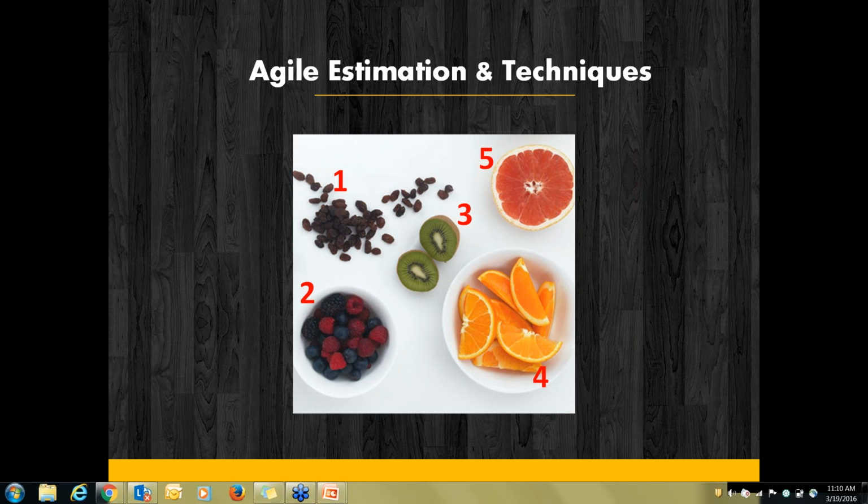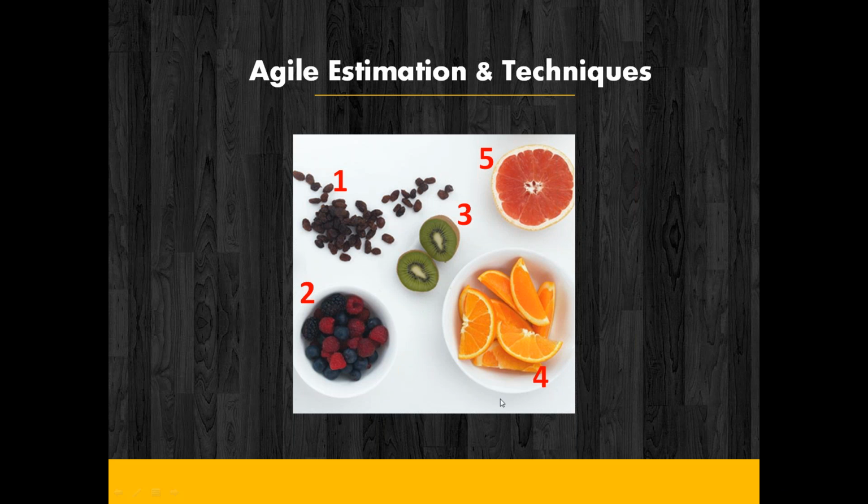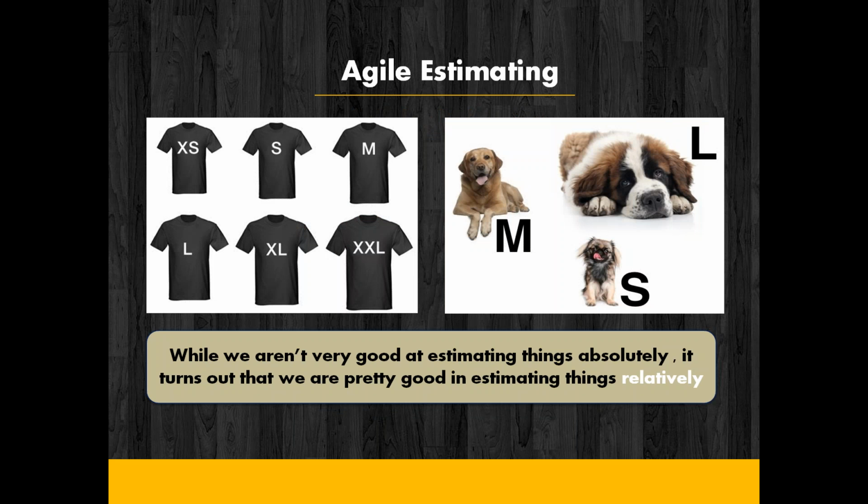So the cornerstone of relative estimation is comparing with some baseline. If I ask the team to come up with an estimate on an absolute scale, they come up with varying ones. But with the relative one, humans are very good at estimation when they have to compare something with something else. So that is called relative estimation.